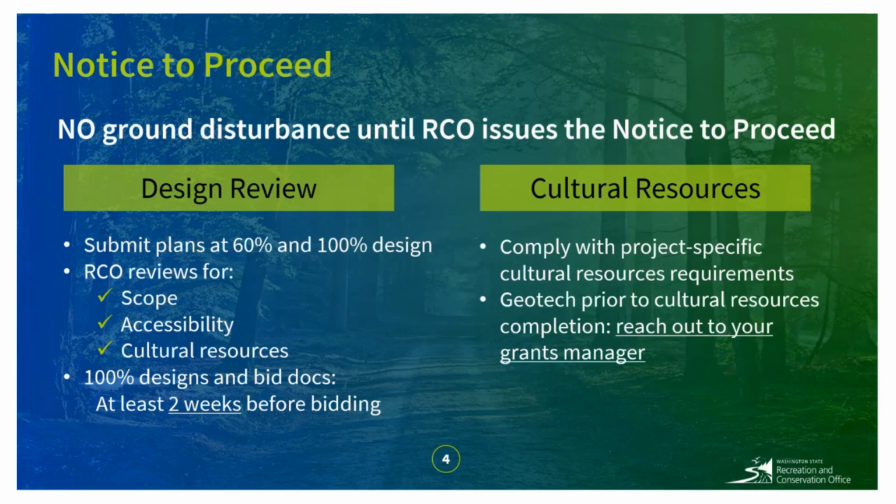Please note that the no ground disturbance prior to notice to proceed requirement also applies to pre-construction work such as geotechnical testing. If your project requires ground disturbance like geotech before your notice to proceed is issued, please reach out to your grants manager to determine how to secure cultural resources clearance.